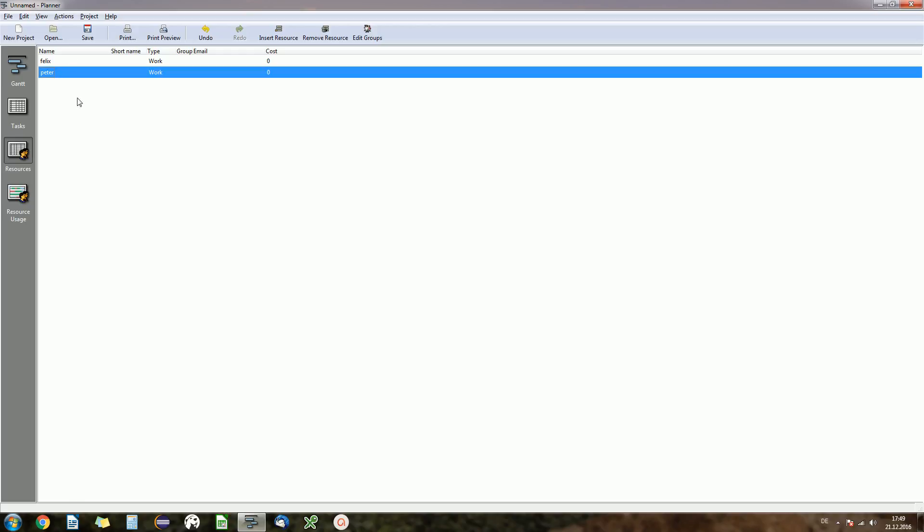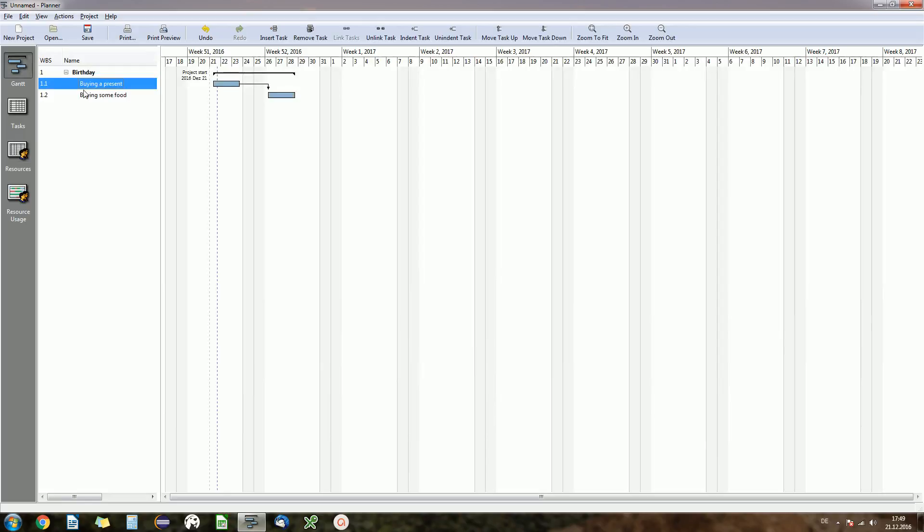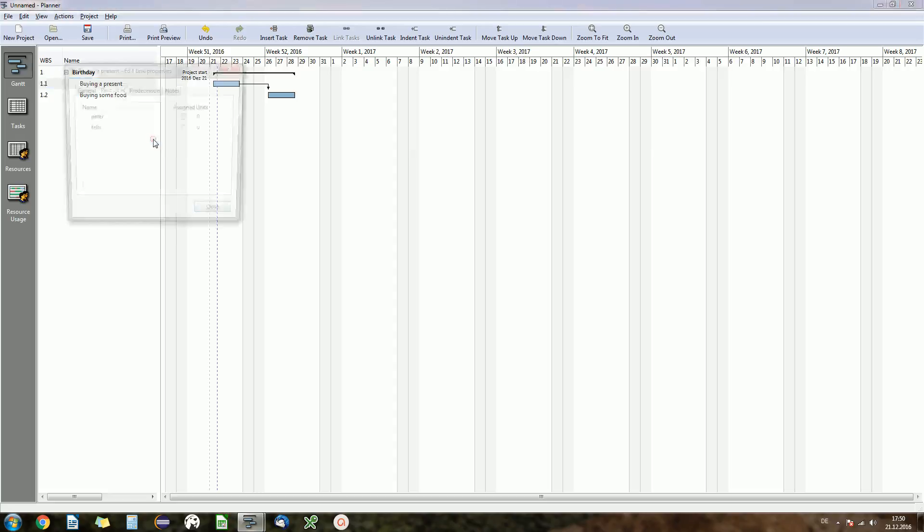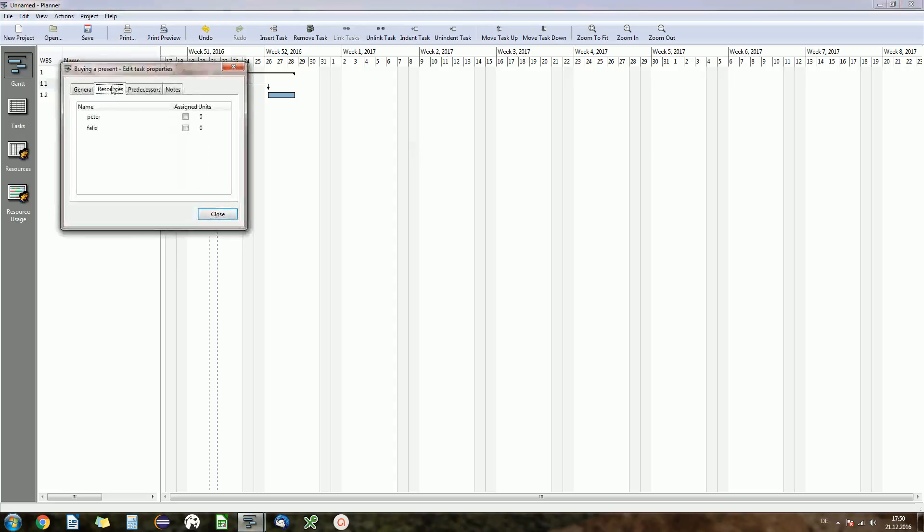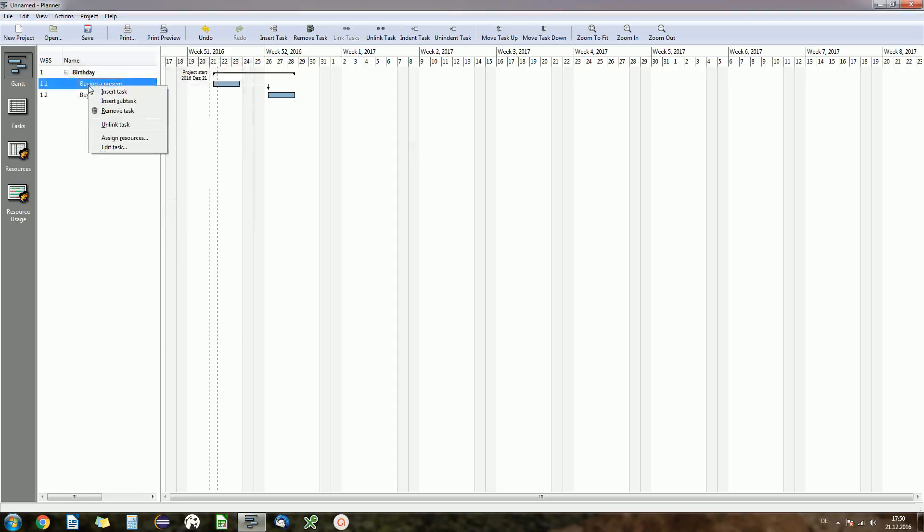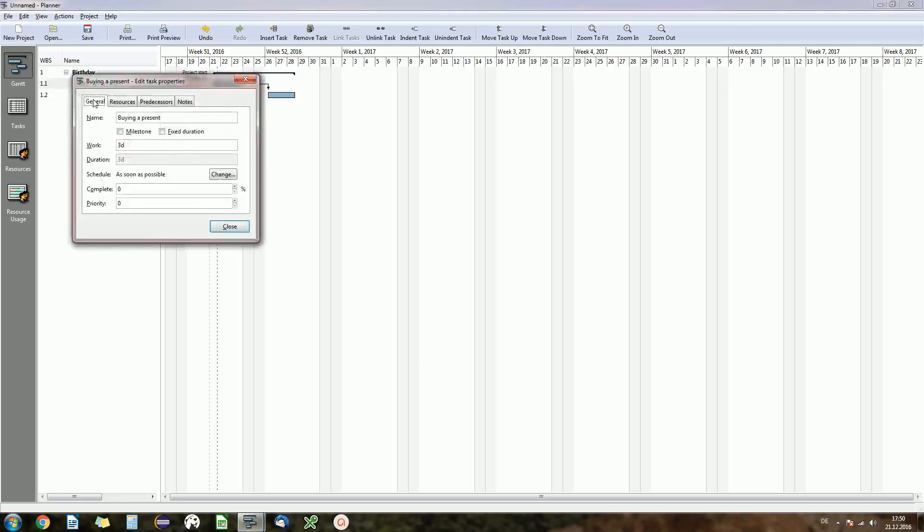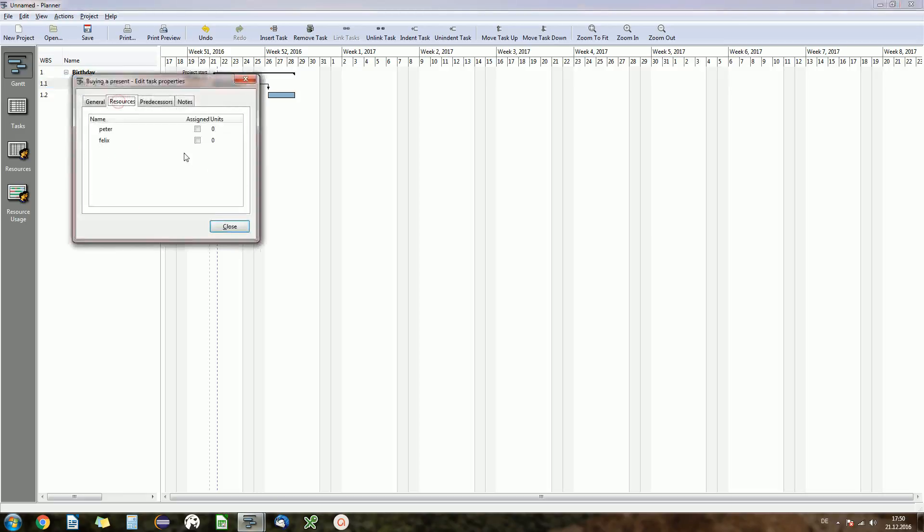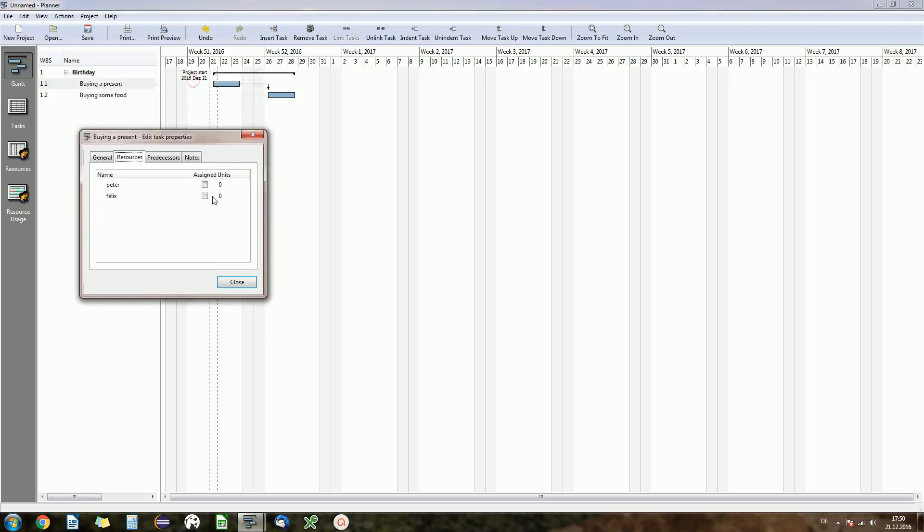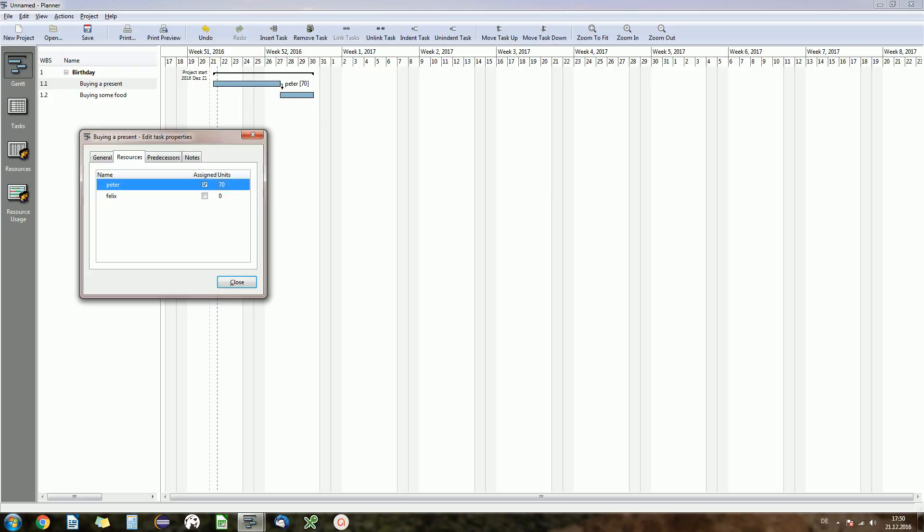So we both are planning a birthday. And now we want to assign the resources, namely the persons, to our tasks. And for doing that we go to Gantt chart again, right click on buying a present, assign resources. And that's the same, you will end up in the resources tab. You can also go to right click, edit tasks, and then resources. That's basically the same. Now you can say Peter buys a present, but it's only one of his tasks, so maybe it's only 70 percent of his time.